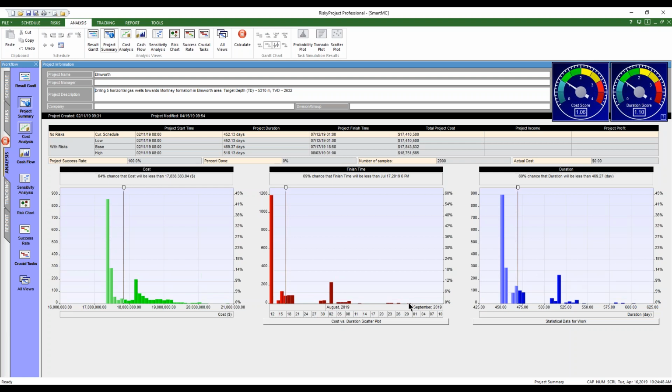In most studies that I've seen, it's now looking at around 50-50. Most people say it really depends on the type of project. The more it's technology development or R&D, the higher the relative variance is going to be, based on that inherent uncertainty that can't be managed.